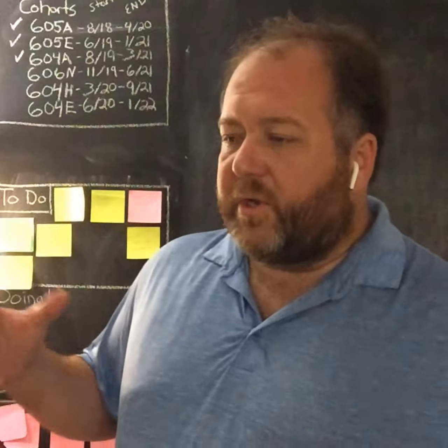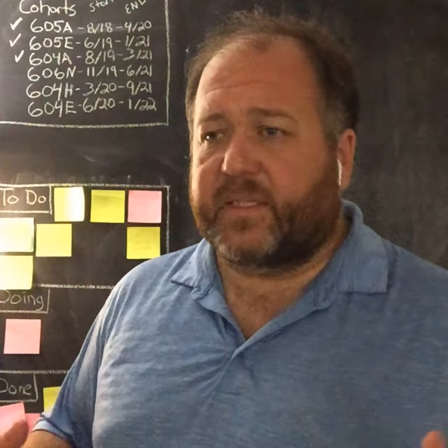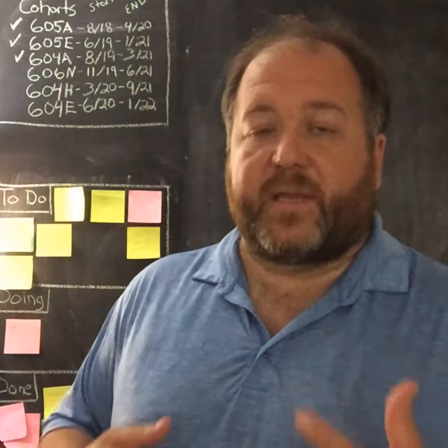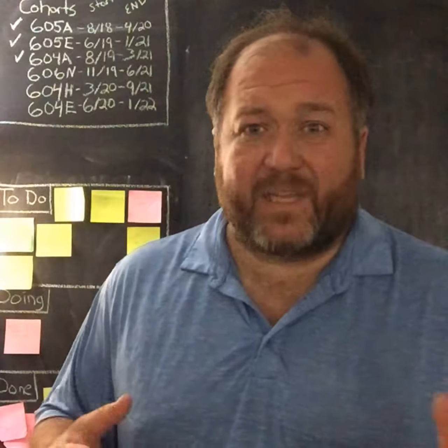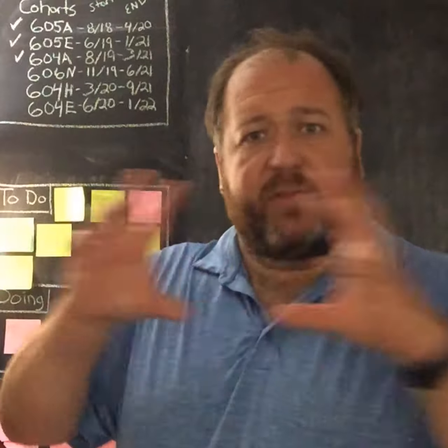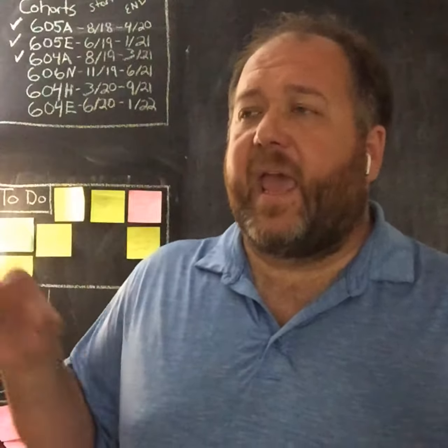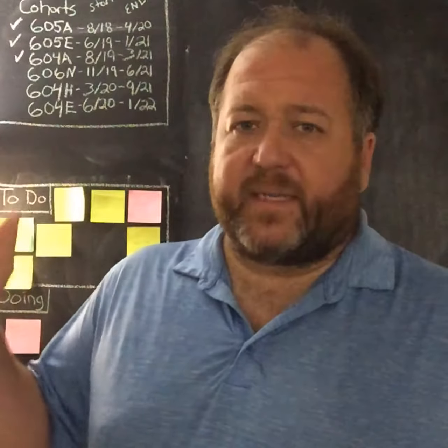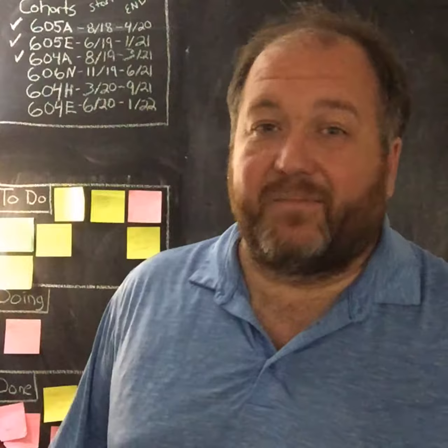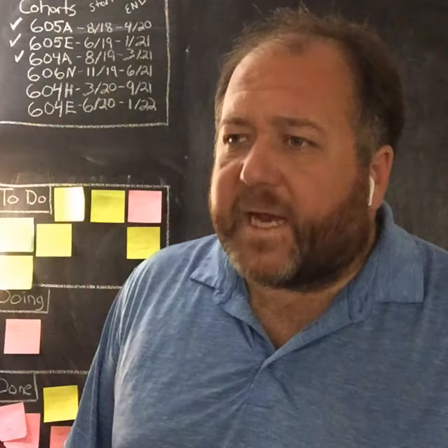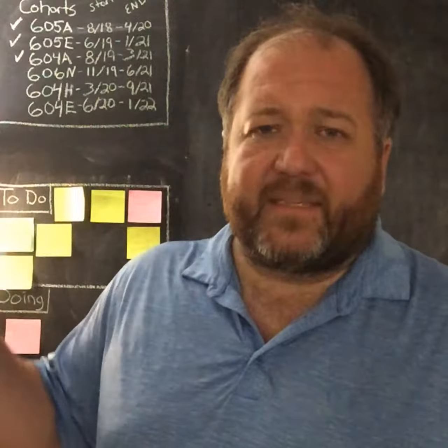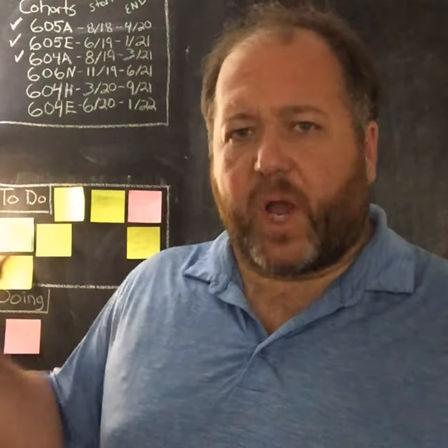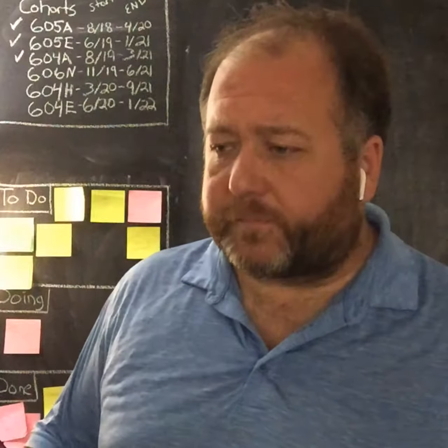And when you go for the scope approval and you're bringing people into the meetings, I also like at this point to have at least a rudimentary WBS, a work breakdown structure. And a work breakdown structure is exactly what it sounds like. It is either a flow chart of the different phases and the different tasks within each phase, and then the different subtasks. Or sometimes it's done as an outline. These days, most of the time it's done as an outline. But I like to have at least the phases and the tasks in those phases and maybe a subtask or two, just to get a broad overview so that people can be on the same page.